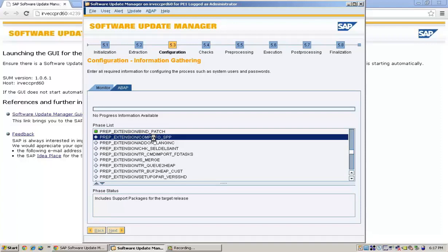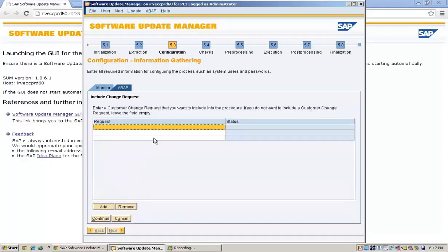Then, say we are upgrading 5 months down the line. During those 5 months there were support packages applied on the system that you are running. So we may be at a particular level which may correspond to 400, or it may correspond to number 7. We need to decide that the corresponding packages must be identified, otherwise we may end up with data loss.